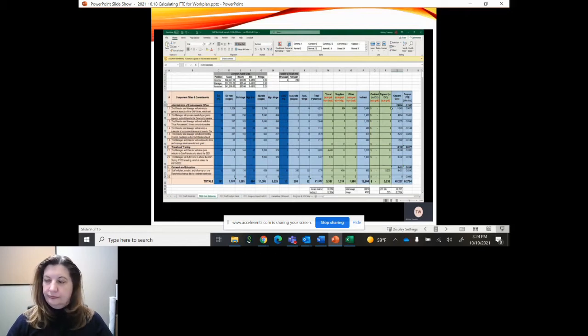It's $25,654 right now. And when we change our indirect cost to 52%, we're going to expect that to change, and we're going to expect the total to change from 48,257 to something else as well. So let's go make a change over here to 52% and see if it works. As we change to 52%, all these numbers in the table update, and you come up to 27,242, and you come up with a total of 50,923.